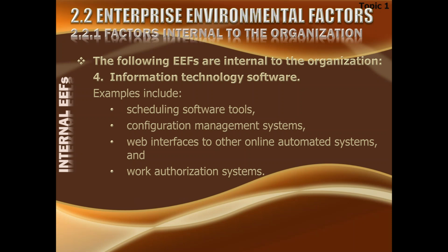So there must be a report, there must be a system which would monitor, which would record the authorization of the work. Although I have assigned this work to you, when you start the work, it is your responsibility to intimate me that this work is now started or it has now finished. And if I have provided you a format, you may have to fill in that format and seek written permission from me: sir, is it okay if I start this work now? So when I give you the permission, I will record this time as the start of this activity.